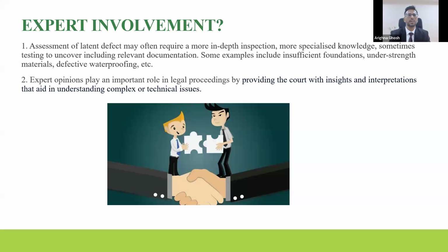Last but not the least, of course, the project records. By project records, I mean the correspondences, the NCRs, the snag list, the work inspection report, material inspection report. What else?